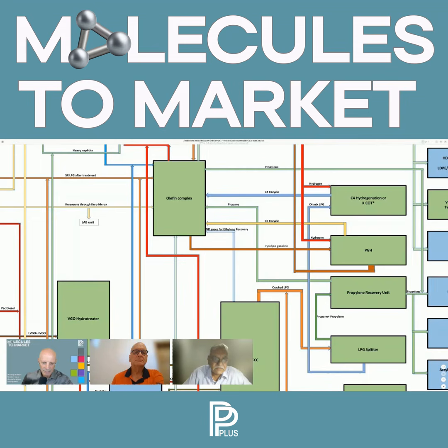Now, after this, there is an EPC schedule, which could be 30, 32 months, 36 months, whatever it is. So that plus feed, award plus feed, overall time cycle is always a lot more than EPCM. Therefore, in India, very few projects we have built on EPC route.